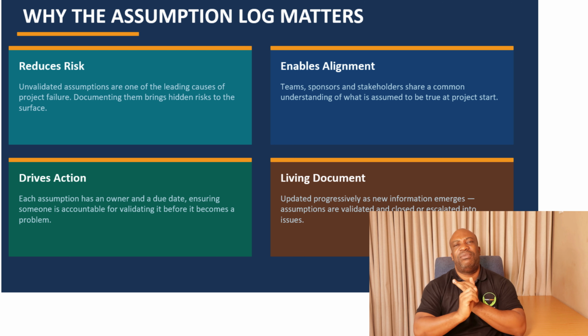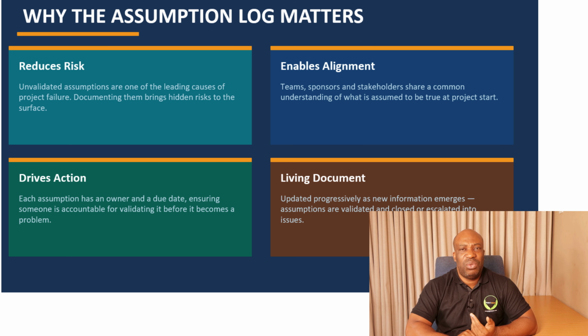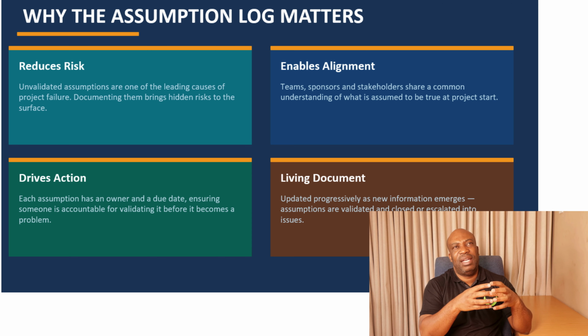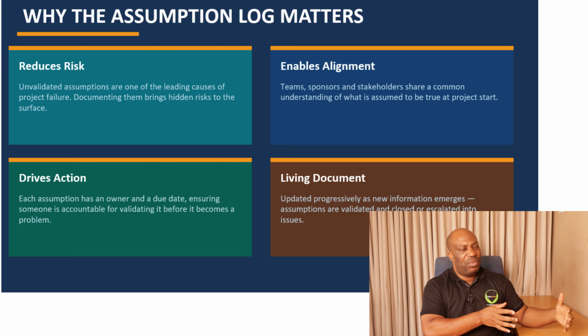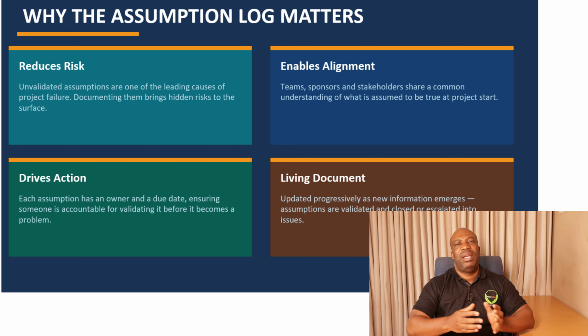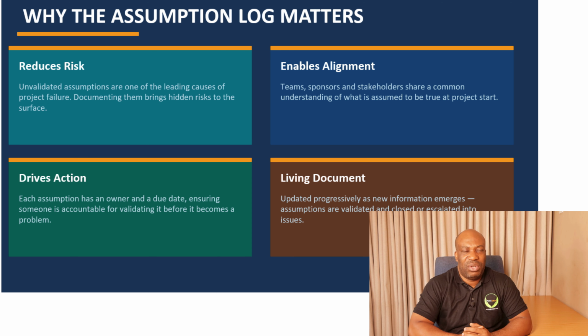So the first point that you have to consider is to reduce risk. Once you assume something, it gives you an opportunity to actually analyze it, to actually validate it before it becomes a risk. I can give you a good example, of a software project. You might assume that the old servers, or old infrastructure, are going to be used as part of the new project.